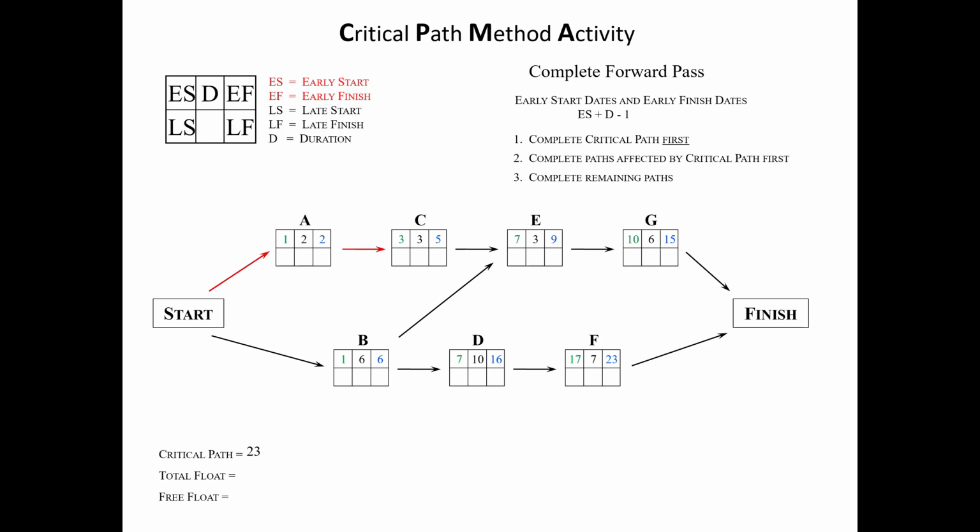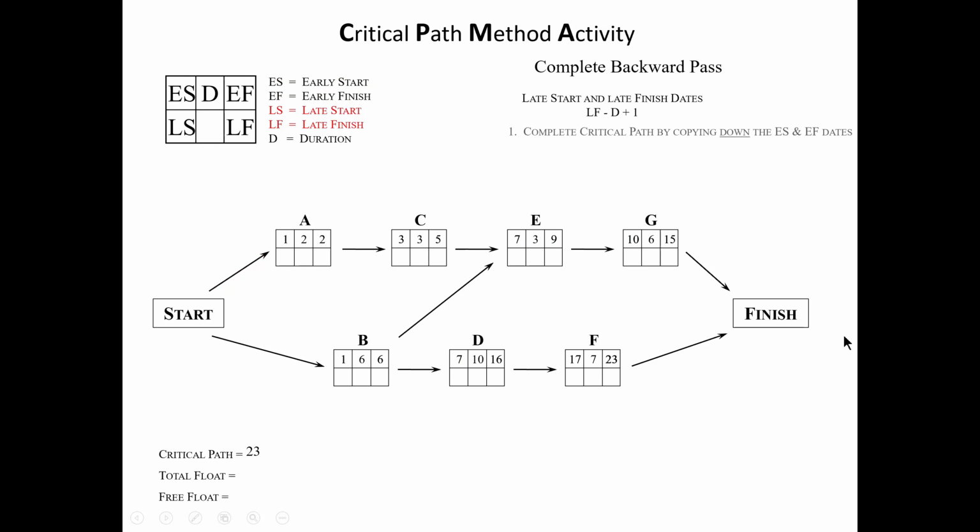Now, if you look down here at F, F is day 23. You're going to now drop your numbers down into your critical path. Your critical path has 0 float, so your forward pass and your backward pass are identical for your critical path. You're also going to move your longest date up here to your non-critical path's late finish date, which is G of 23, because from F, your critical path's longest date was 23. So 23 will go up here to G.